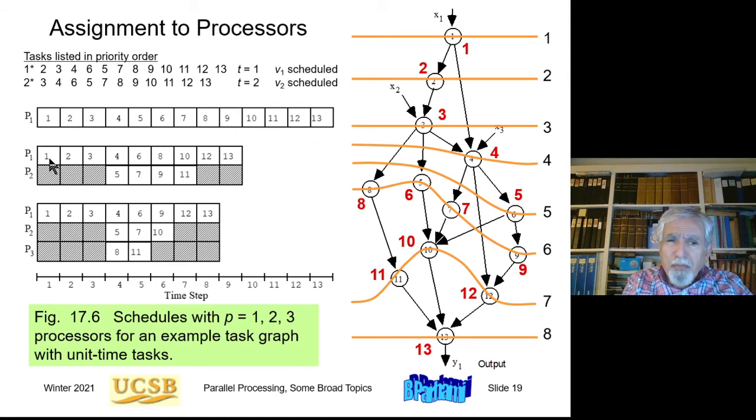Here we have 2 processors. So 1, 2, 3 again. Then when we execute 3, task 4, task 5, and task 8 become ready for execution. Okay, so 4, 5, and 8 will be starred in the list. I take the first two, in order of priority, 4 and 5, and execute them. 8 will be left.